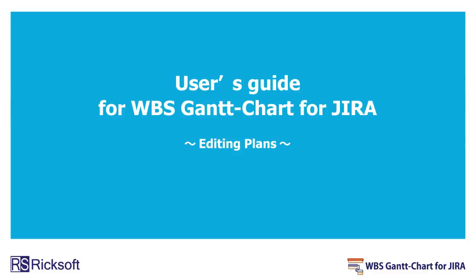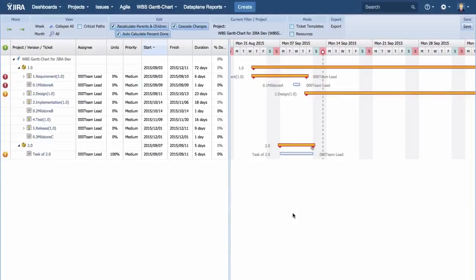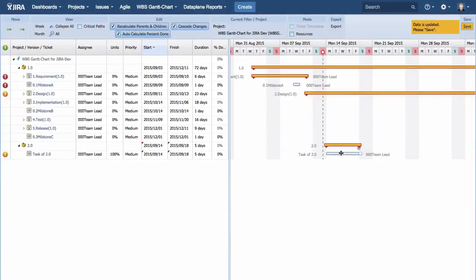Next, plan dates can be set in WBS Gantt chart. By dragging the whole Gantt bar, you can change a start date and a finish date, keeping the same period of time.